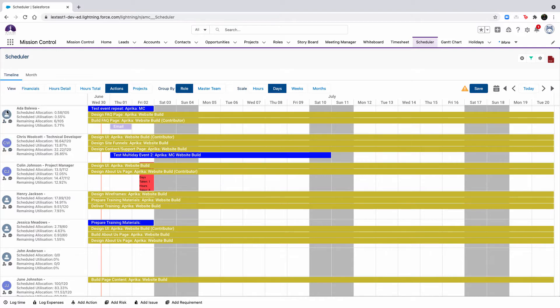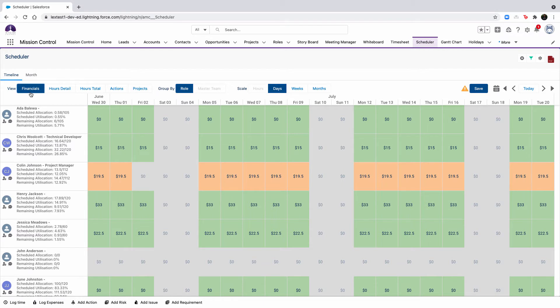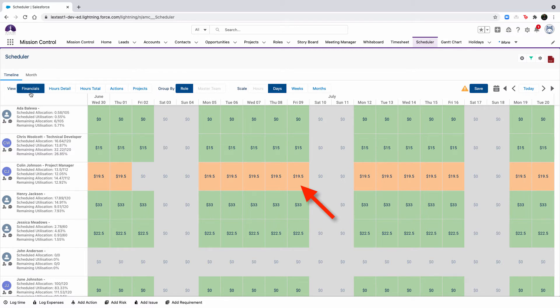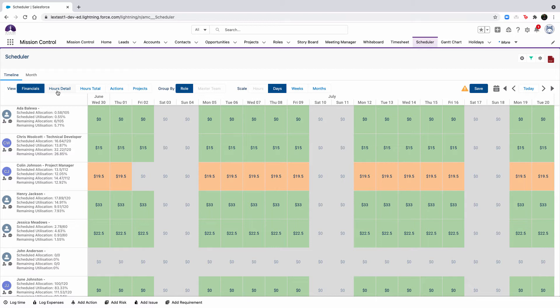Let's take a look at the financial view, which will show you the breakdown of the hours scheduled billable value field across all actions that are scheduled to be worked during the timeline. If a user doesn't have field level security access to the hours scheduled billable value field, then the financials will not be available. The shading of the cells reflects the hours shading breakpoint percent values in the scheduler settings. For example, if I set the hours shading breakpoint value to 80% for that role, then once the user hits 80% of the hours scheduled billable value that is assigned to them, then the cell will turn red.